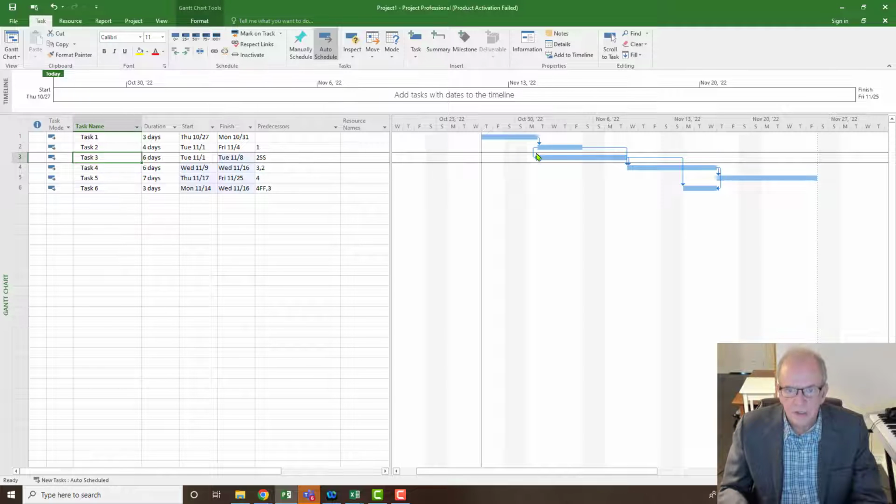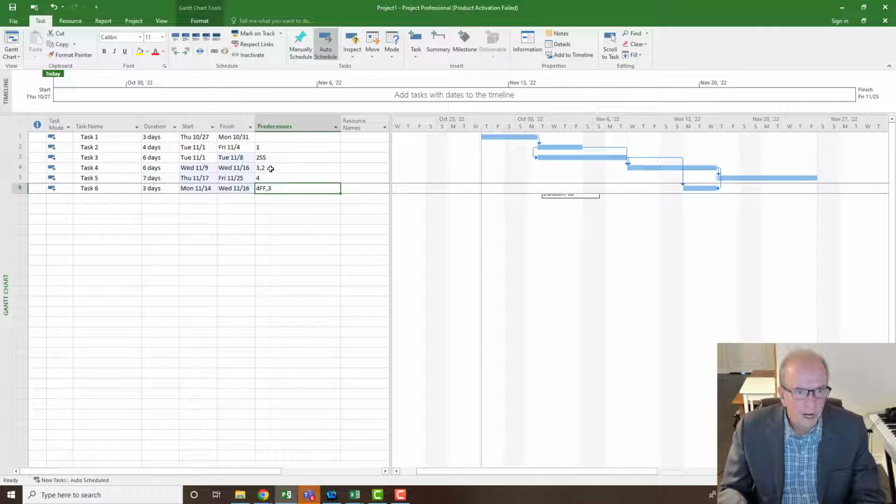Start to start: activity 2 has to start, or activity 3 will not be able to start, right? So that's important there. And finish to finish: in this case, activity 4 has to finish, or I won't be able to finish activity 6. And we should make sure that there are no open ends, that our connections are completed so that we have a complete network here.